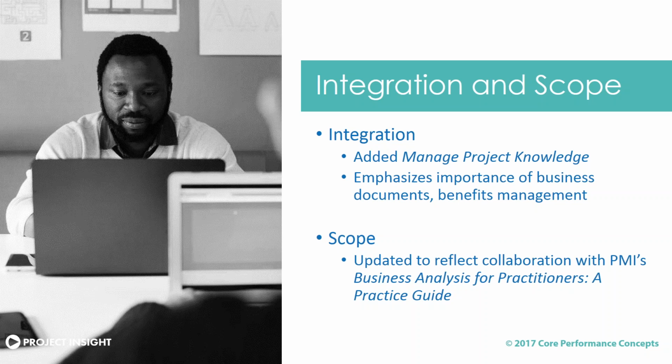And the lessons learned register is updated throughout all of the processes, because it's in integration. That makes sense, because integration touches every other knowledge area and every other process. Business documents are inputs into the develop project charter and the close project or phase processes. Again, saying business documents are input to the project charter emphasizes what we talked about earlier, how closely benefits management is managed by the project manager working with your sponsor and other stakeholders.